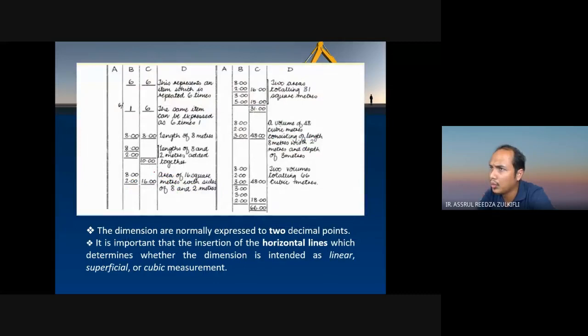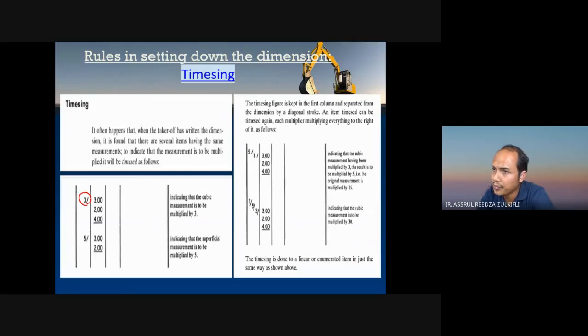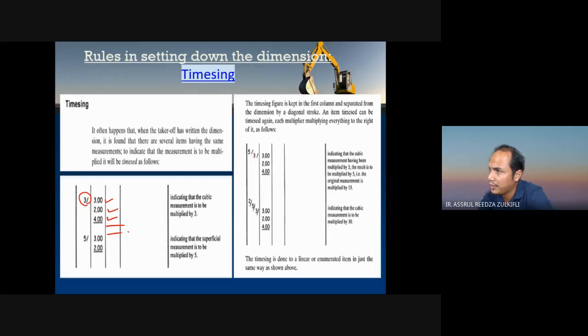This is the example of how you use the taking off sheet. It's called a taking off sheet. Usually it has two columns — the first taking off sheet and another taking off sheet side by side. You can use it until you finish one side, and then use the other side. This is the timesing column: 3 multiplied by 2, multiplied by 3, multiplied by 2, multiplied by 4 — so you get the answer. You can also do 5 multiplied by 3, multiplied by 3, multiplied by 2, multiplied by 4, depending on the item you are calculating.